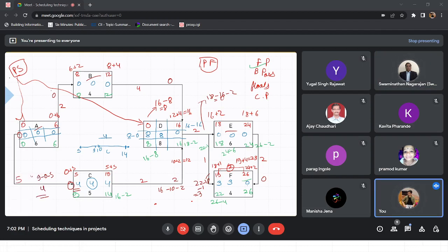Sir, just one interesting point based on what you told. I think it's right to assume that, let's say at the time of the project start, we draw this diagram and determine the critical path. Let's say after about 10% of the work is over, we have to relook and see what has been exhausted, and we may find that the critical path has changed. Right? It is possible, right? Yeah, definitely. If we have used some buffers, or not used them, depending on that, the whole path might change. We update the schedules at regular intervals for that.